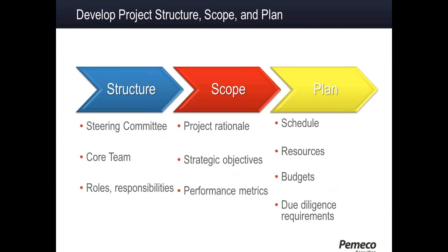Basically, we're going to start off talking about the overall assessment. There's a project structure that we like to have in place, and in driving to the startup of the project, we're looking for a steering committee, a core team of your best and brightest resources, a clear definition of their specific roles and responsibilities relative to the assessment, with the thought going forward that these will probably be the key players in a selection, analysis, and implementation project ultimately.